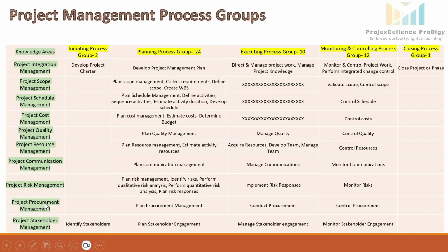Next, under the procurement management knowledge area, there is one activity under the planning group: plan procurement management. All necessary details such as vendor selection, type of contract, procurement matrix, various bid documents, and procurement SOW, meaning sufficient details of the items to be procured, and the make or buy decision will be part of this procurement management plan.